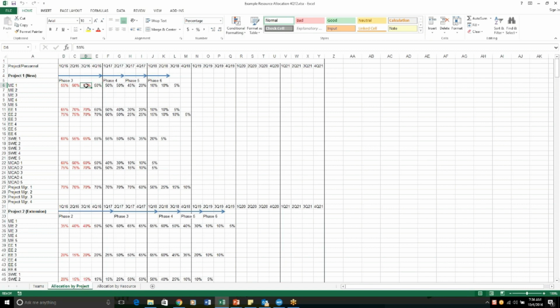And in terms of collecting this data, it doesn't have to be really heavy-handed. I mean, you could implement some type of a time card. I don't think it's necessary to do that on a daily basis. Again, depending on the scope of the project really is going to drive how often you collect the data. When I did this, as I was collecting data on a quarterly basis, we did weekly accounting. It was basically just asking the resource to go back over the course of the week and get a rough estimate on how much time they spent on the various projects. So you don't have to go really overboard in terms of collecting this data.